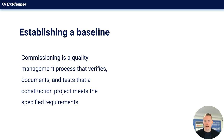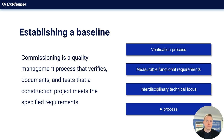First, we're going to establish a baseline. Commissioning is a quality management process that verifies, documents, and tests that a construction project meets the specified requirements. The commissioning process has something to do with quality, management, and it's a process. Normally, we can put four main topics on the commissioning process. It's a verification process — everything we do within the commissioning process must have some relation to verification. The verification can be on-site inspections as visual verification, review or scrutinizing of documents, and the final verification which most of us relate to — the testing, where you test that the system fulfills the requirements.